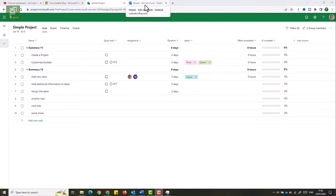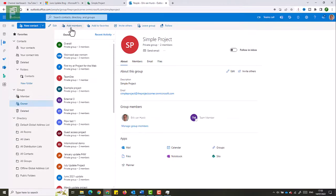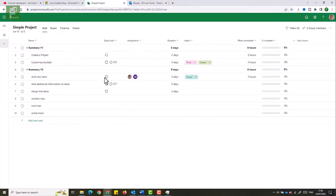Just before I show you what the team member can do, make sure to have that team member as part of your Office group. If you didn't do that already, you can go to outlook.com and from there find the groups that you're an owner of, then simply add new members — manage group members or click the add members button. So team member is part of our project and has an assigned task.